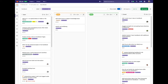Boards are the visual information radiators for project management, and are crucial for organizations and teams using Scrum and Kanban practices. We use them to plan, organize, and visualize a workflow for a feature or product release. The issues — or user stories, bugs, features, or whatever you call them in another system — are shown on the boards in the form of cards, and they provide a team with a central location to visualize and track the work in progress.